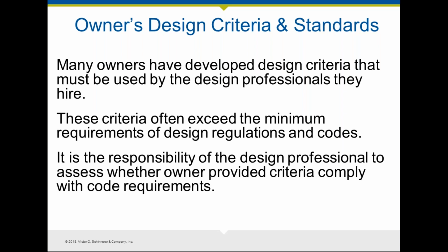They may require a 5-foot sidewalk instead of the mandated 3 or 4-foot sidewalk that the county may have, and so on. You and the owner need to be able to identify these and put this in your project planning document, so that when you're actually doing the design solution, you know what they are and you've come to an agreement.